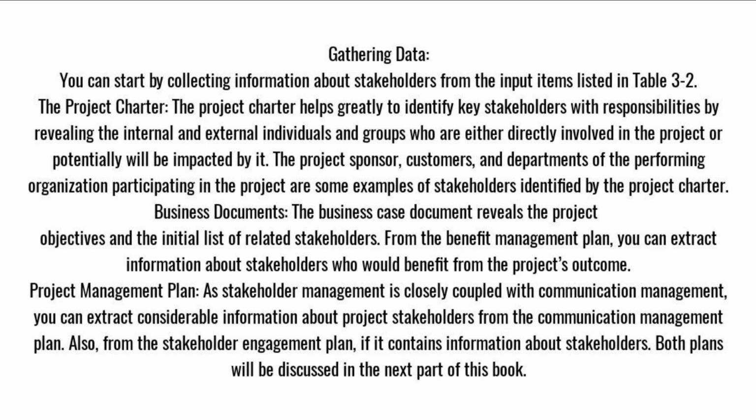Objectives and the initial list of related stakeholders. From the benefit management plan, you can extract information about stakeholders who would benefit from the project's outcome. Project management plan. As stakeholder management is closely coupled with communication management, you can extract considerable information about project stakeholders from the communication management plan. Also, from the stakeholder engagement plan, if it contains information about stakeholders. Both plans will be discussed in the next part of this book.